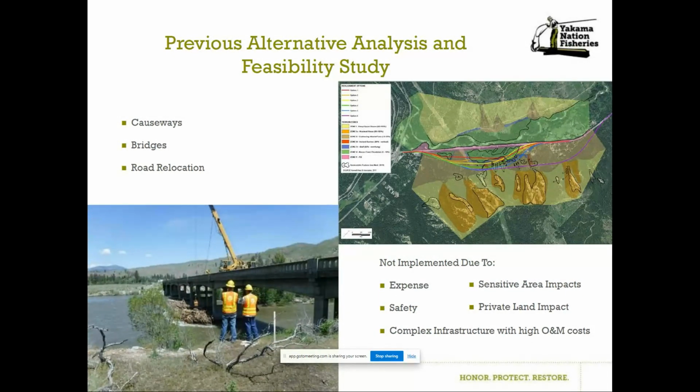And actually, they found out through the reports and survey work that both options, this is option 6 and the blue line is option 5, are impacted by avalanche situations, where options 1 through 4 deal with fill and private property, and all options impact private property. So that's what drives that price up considerably.